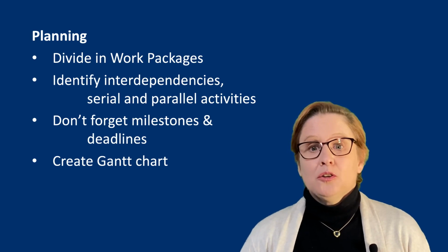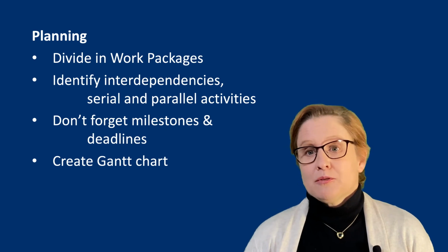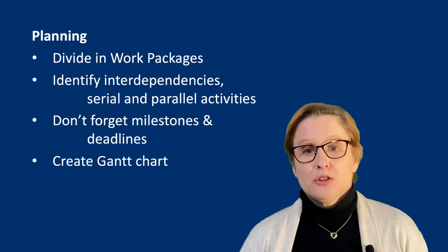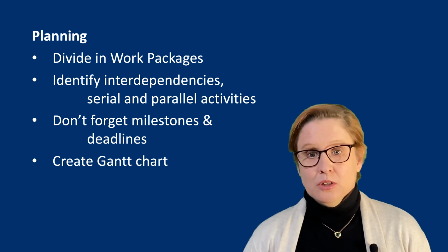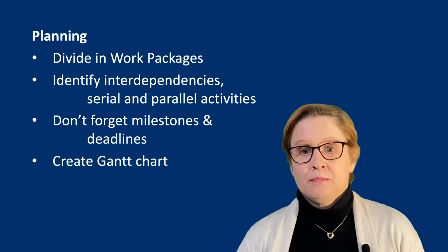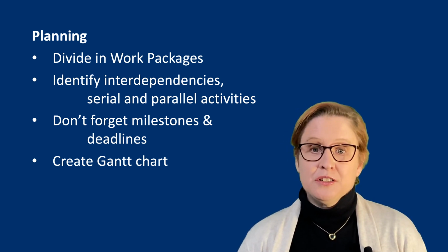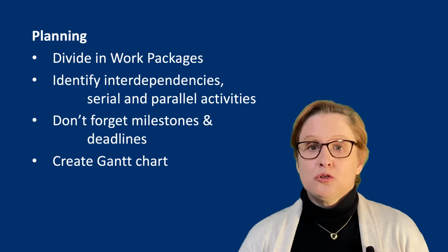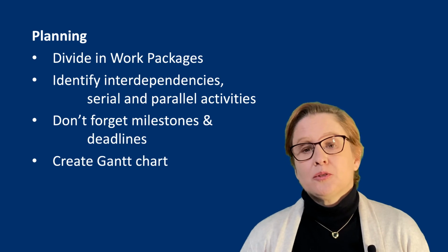The next step is to include a planning of your research. In a planning, you must, at a reasonably high level, try to estimate the time required for each part of the research and any potential research constraints, and then fit that into a schedule. Note that some tasks in research will be concurrent and running in parallel. Therefore, make sure that your planning is realistic and contains iterations and interlinking of activities to show how activities may depend on each other. Provide explanations to motivate your planning.